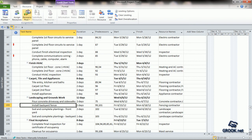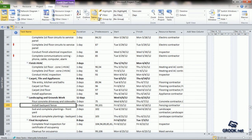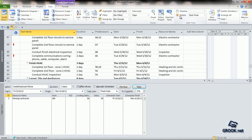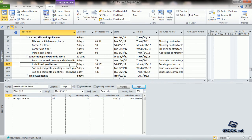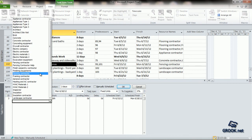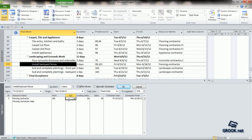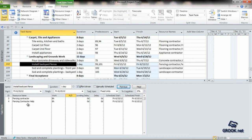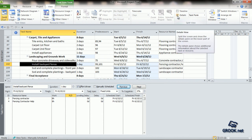Let us see another way of assigning this additional resource. We can click on the task, go to the View tab, Split View sub-tab, and click on Details. In the task form below, we can confirm that Effort Driven is checked. In the resource name field, we can click the arrow on the right and add the new resource. When we click OK, we see that the work has been divided between both resources — instead of 16 hours for only the fencing contractor, it becomes 8 hours each. The duration automatically reduces to 1 day.